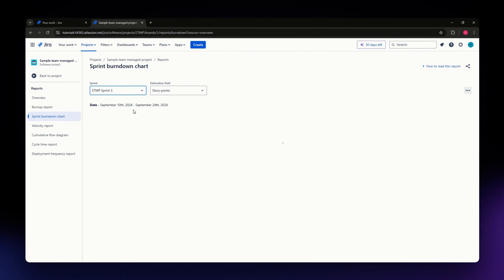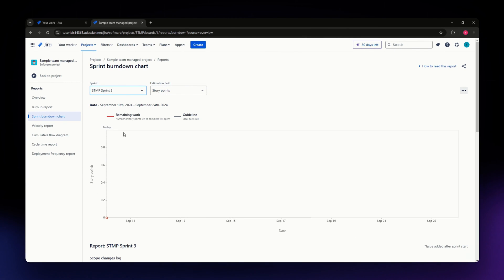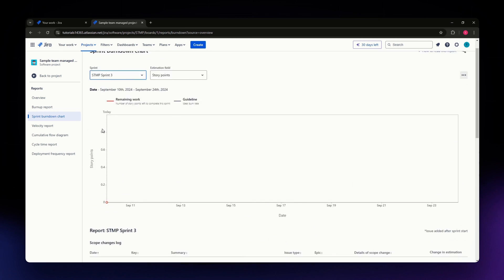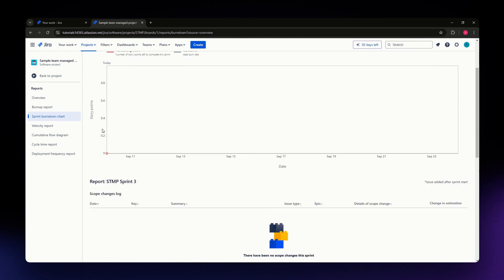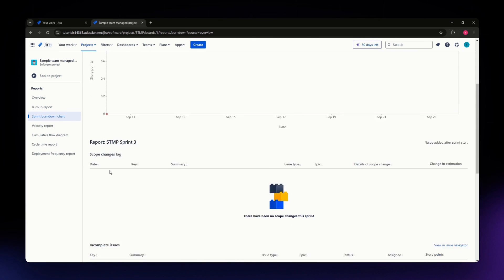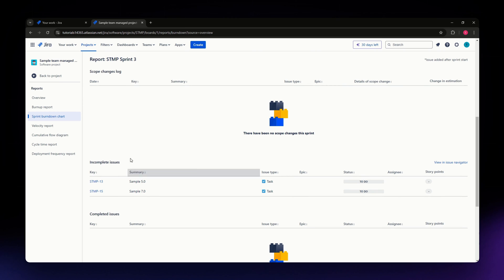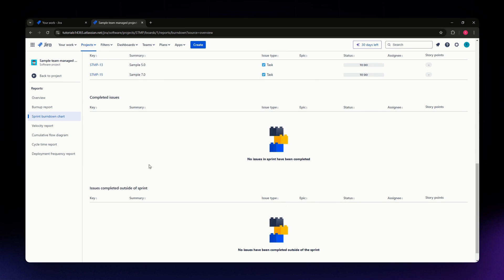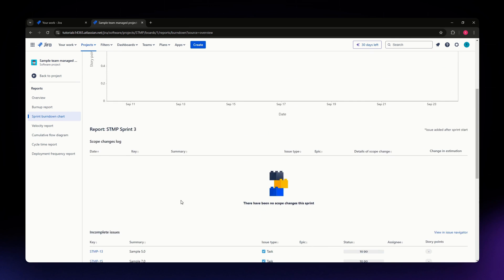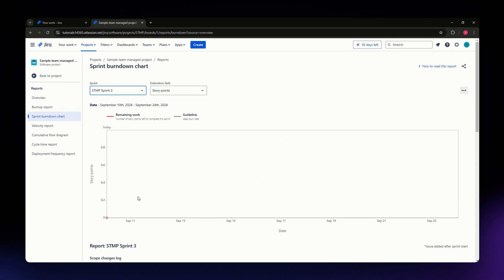Click on the sprint you want to see details for, and once you scroll down, you'll be able to see the incomplete issues, scope changes, logs, and so on. That's basically it—that's all you need to do.